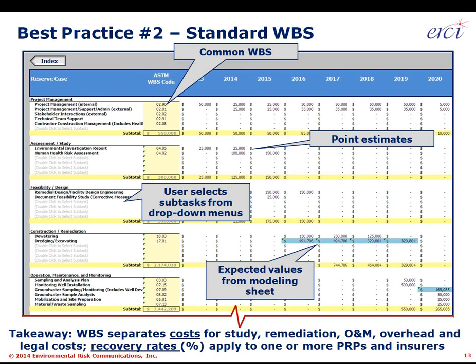And that spreadsheet, in turn, doesn't look like any other spreadsheet generated by any other consultant for any other project. And that, in turn, is the challenge of ensuring consistency across a portfolio: you have perhaps some line items that are an essential part of some forecasts, and those same line items may be completely left off or omitted from other forecasts. Those can be costs, for example, the cost of remedy failure, the cost of project overhead, external and internal legal expertise, and counterparty risk of default.